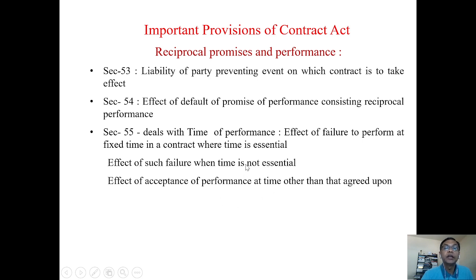Now, what does it say? Whether time is essential or not mostly depends upon the terms and conditions of the contract. Just for an example, if a contract is having an extension of time clause or an LD clause, fundamentally it looks like time is not essential, because there is a provision in the contract on accepting a delayed performance with LDs, or for owner-caused delays or some sort of delays, there is an extension of time provision. So whether time is essential or not, whether the parties have agreed or not, or what the contract position says, the intention of the parties is judged.